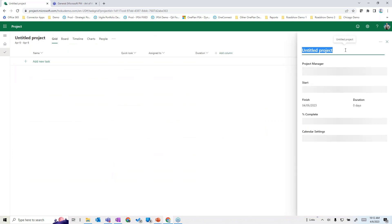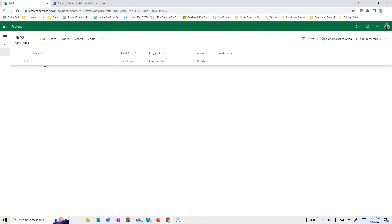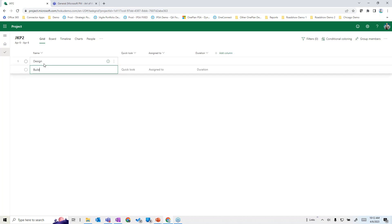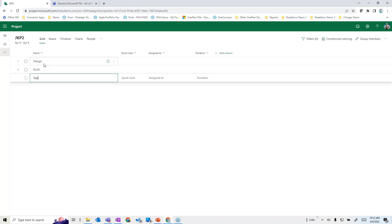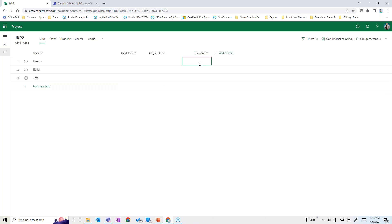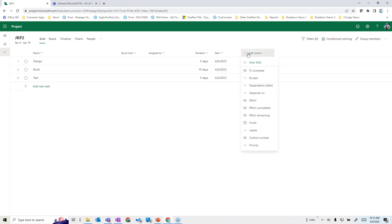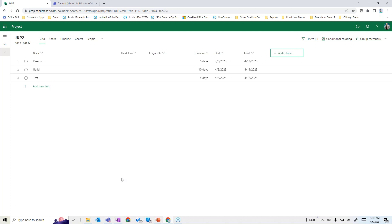Starting from a blank plan, it's simply a matter of naming your project. You can then start adding tasks like you would in a list view — for example, design, build, test — just easily building things like you would in a spreadsheet but online. You can put durations in, like five days, ten days, and five days. You can also add columns and fields such as start date and finish date very simply.